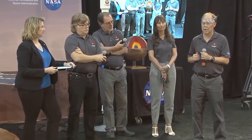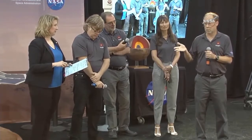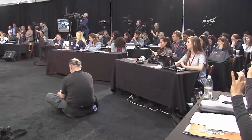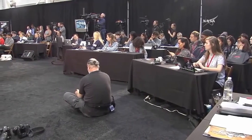So we went to NASA a few months later with a plan for fixing this, and I think we put together a very solid plan for showing that we could fix it, that we could fix it in plenty of time, that we could test it to the level that we would not have any doubt about it once we got to the spacecraft. And between the solidity of that plan, and as Jim said, the importance of the science that this mission was going to return, NASA made the decision to allow us to go forward. They watched us very carefully, as you can imagine. They watched the progress of the seismometer to make sure that we were meeting the milestones. We went and redesigned that vacuum system to make sure that it not only was as good as it was supposed to be before, but it had extra margin, extra ability to maintain this vacuum. And so I hope that answers your question.